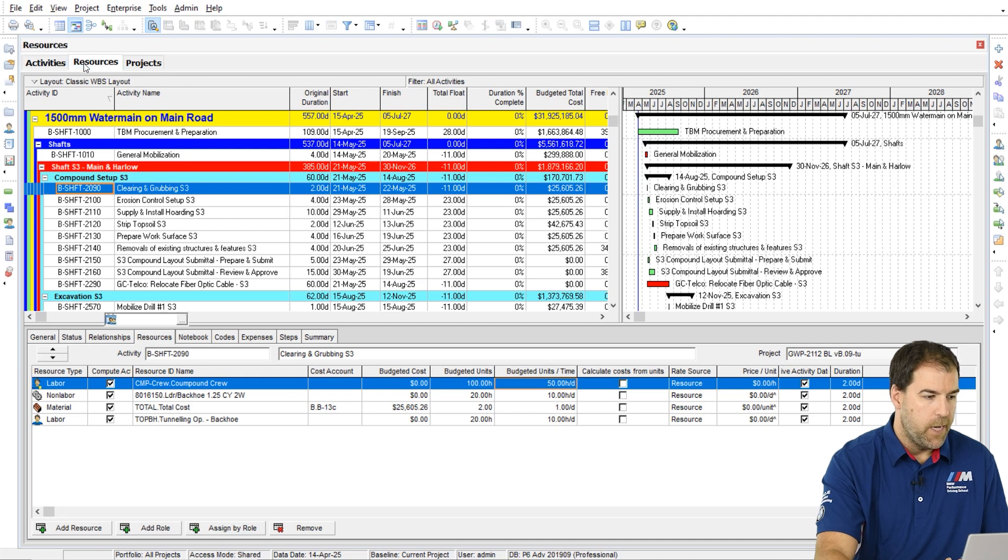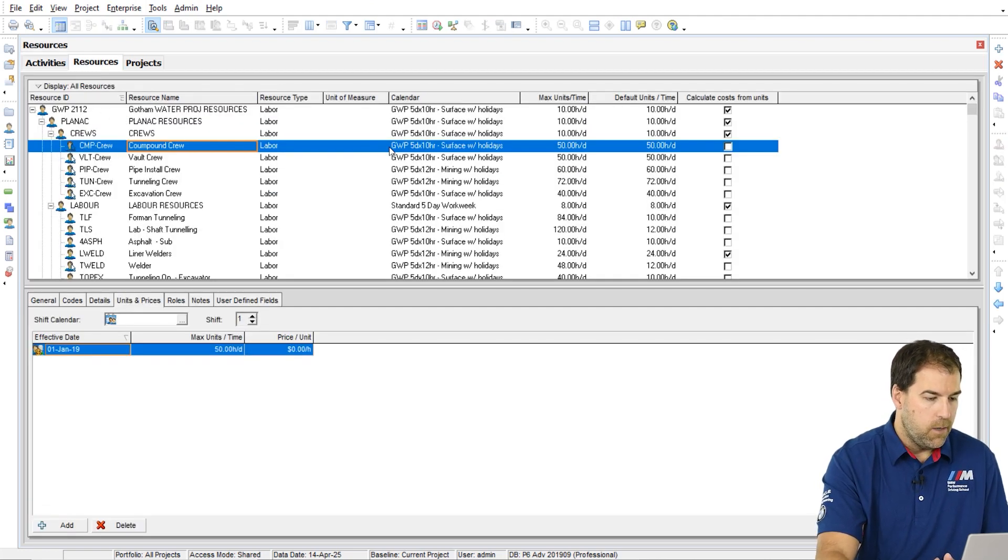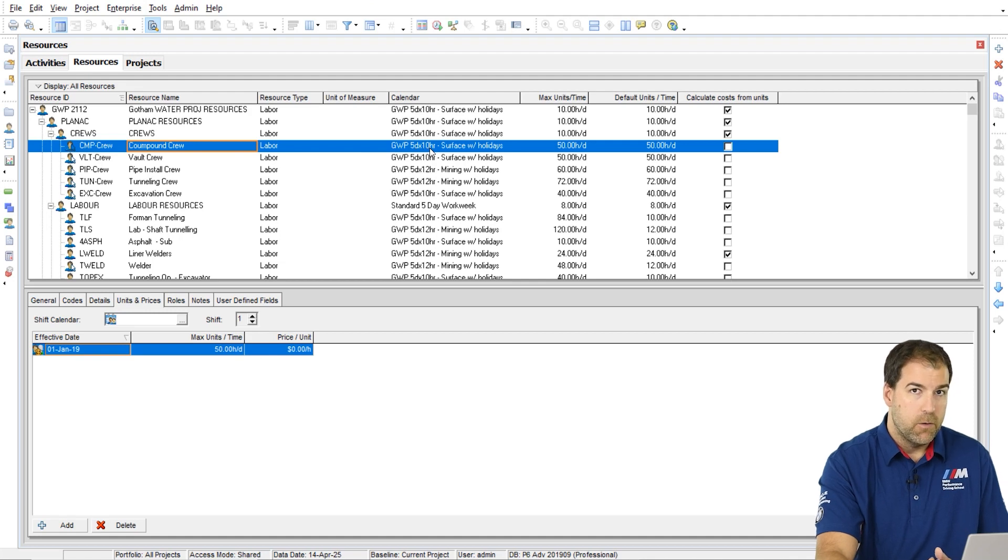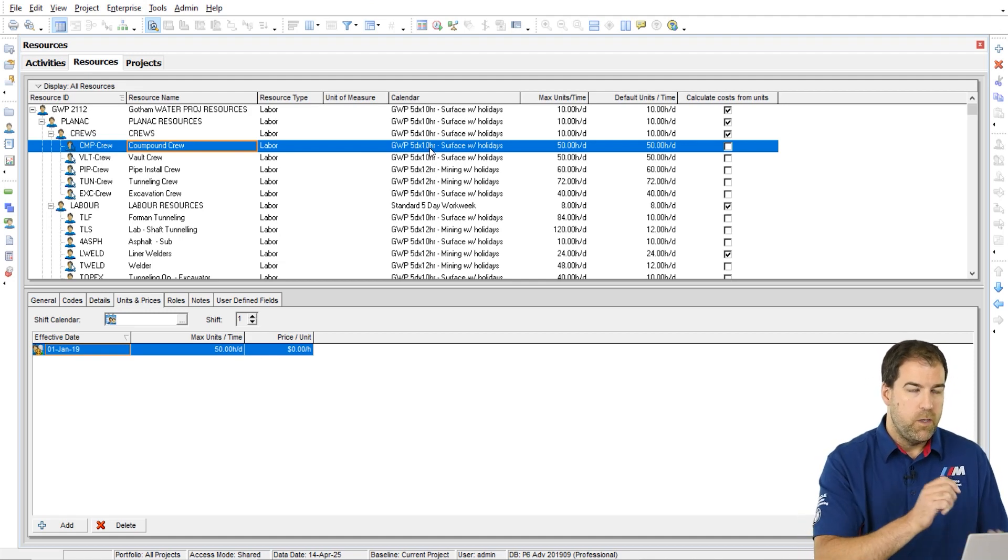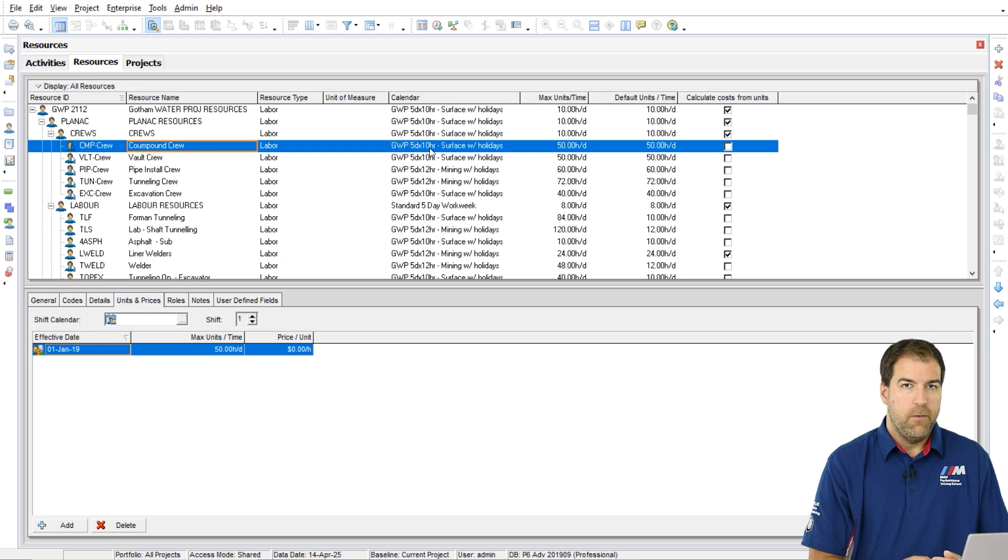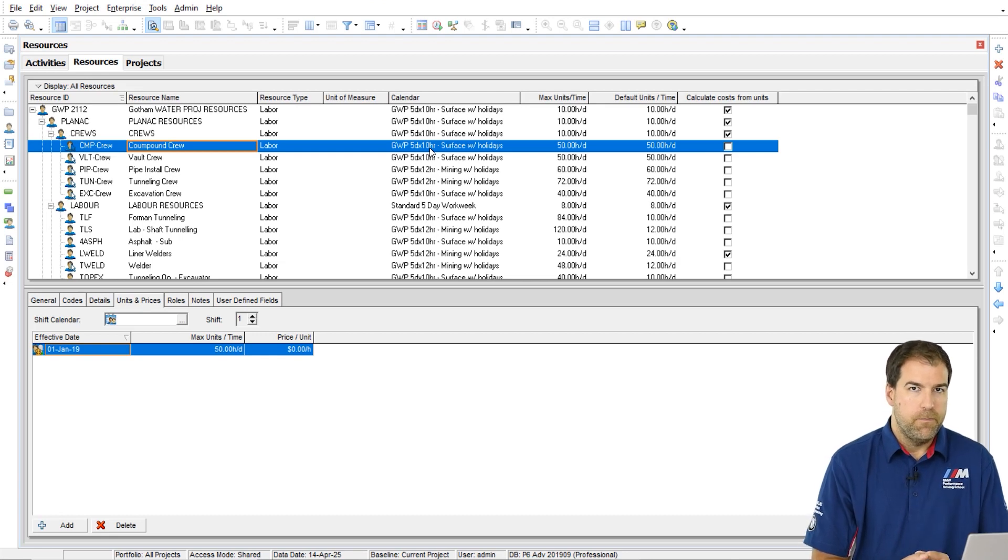So for example, if we go back to our resource setup, you can see that I've got a five day by 10 hour calendar. If I had a percentage, I wouldn't know if I'm matching my calendar or not. So that's important.